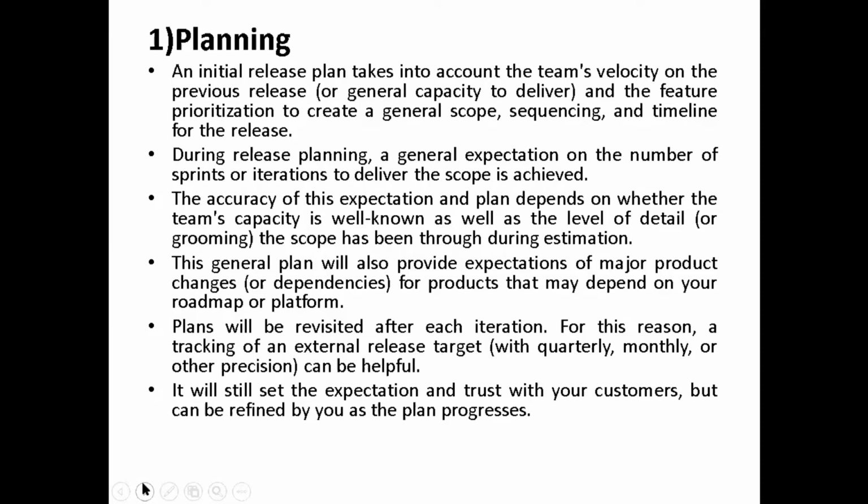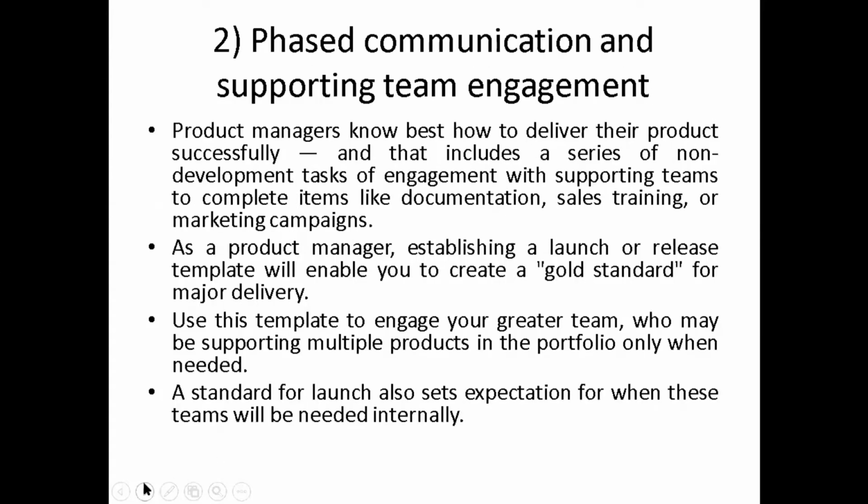See, first I would have told the customer every 4 months I'll deliver an iteration. Then after 4 months I would have seen that 4 months was a long period. I could have completed this task in 3 months itself. So then I'll revisit the plan and I'll tell my customer, no, now every 3 months I'll be able to deliver your iteration. This is what happens in planning. So it will set the expectation and trust with your customers. So if you have a plan and if your plan progresses well, it gives you trust within your customer.